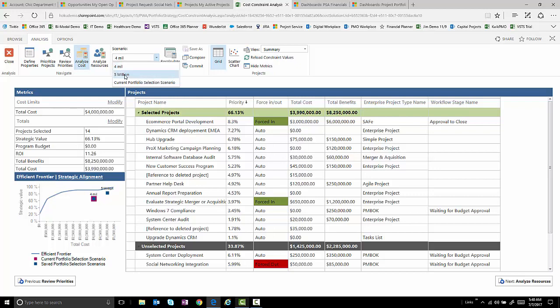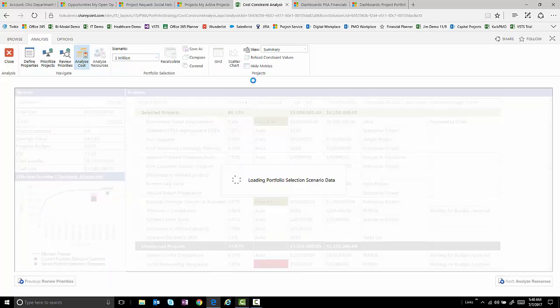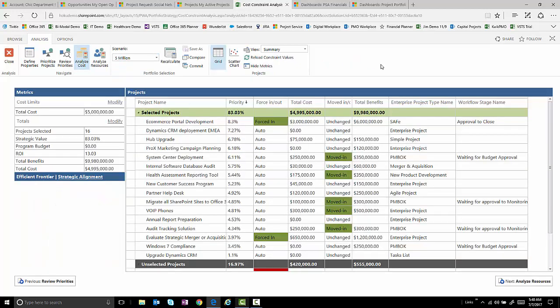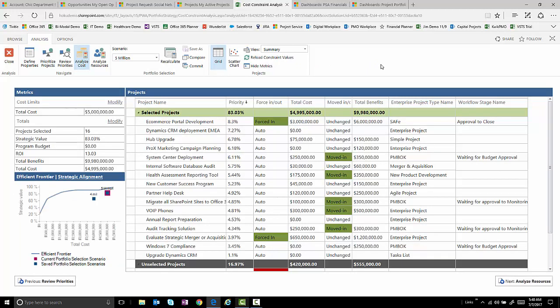We can also recalculate and do other scenarios. So for example, if we actually have say a $5 million constraint and we got another million dollars, we can actually do 83% of the value of that portfolio just if we get another million dollars into that budget.